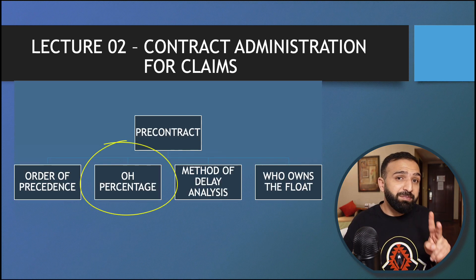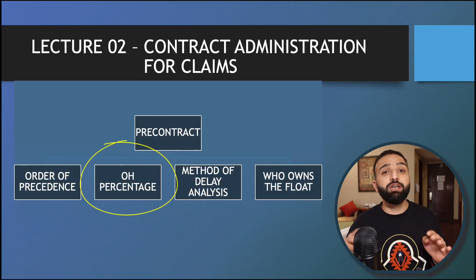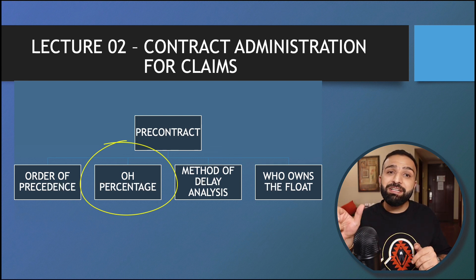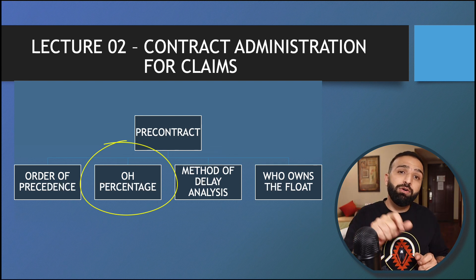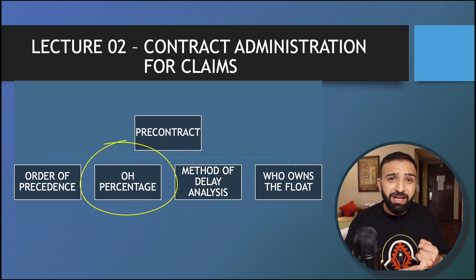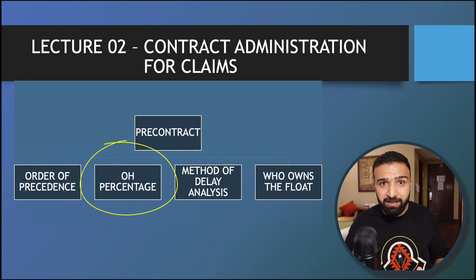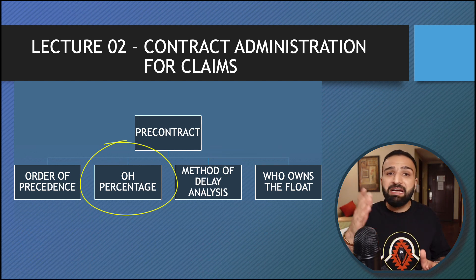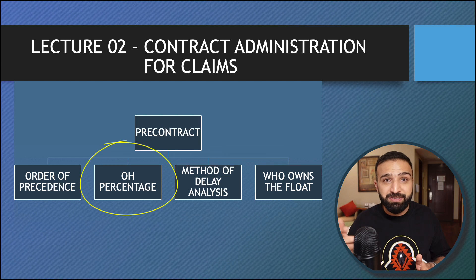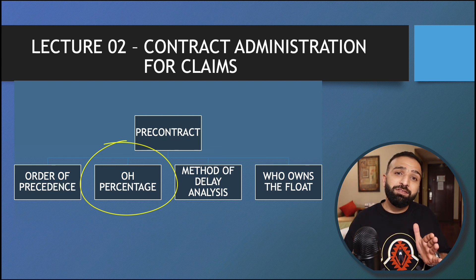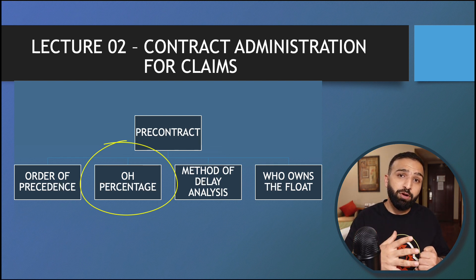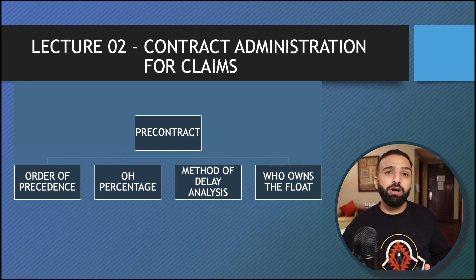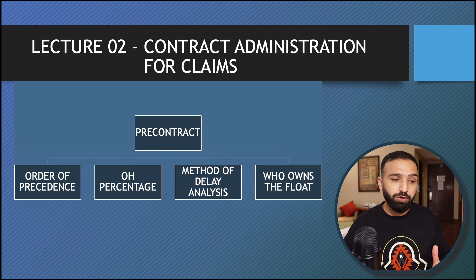The second thing that needs to be implemented at the pre-contract stage is the overhead percentage — basically the percentage of overhead you are allowed to apply on your variations, extension of time, and any other claim. If this ONP is defined properly at, say, 10, 12, or 20 percent, it saves a lot of hassle and you do not have to prove your overhead and profit. We will discuss this in more detail in the lecture on prolongation cost later in this course.